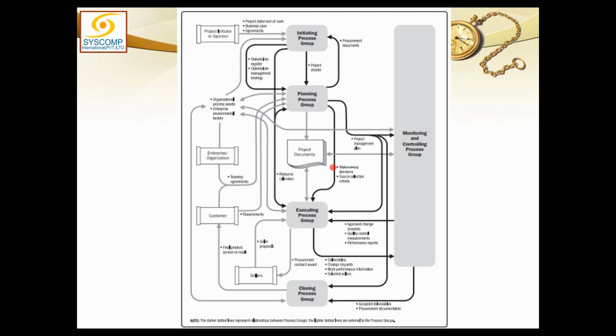And naturally, you will develop some procurement documents like RFPs, RFIs, RFQs, EOIs, and so on and so forth. Those documents, once you create them, although they form part of the project documents, will be sent back to initiation. Project documents are being sent back to initiation. Why? Because when we identified the stakeholders there, at that time, we did not know the procurement documents would exist.